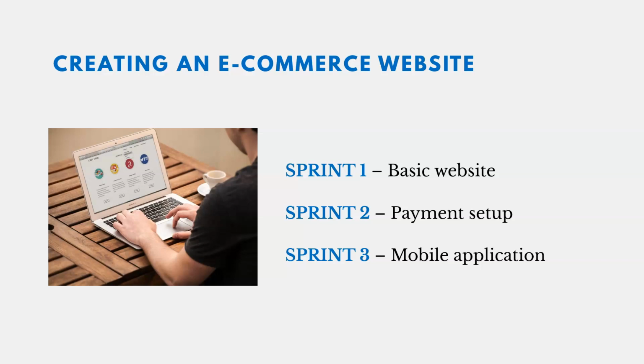So the first sprint or increment is to build a basic website, and then a couple weeks later, we set up payment, and then a couple weeks after that, we build the mobile application and have that ready to go. So we're delivering this thing in small pieces and just building it up, adding to it over time. Again, that builds momentum, morale, excitement. It keeps things going and allows you to make some adjustments, because maybe if you wait until the end of the project to deliver everything, things have changed so much that it's not really helpful or needed.